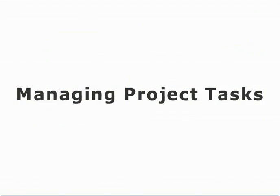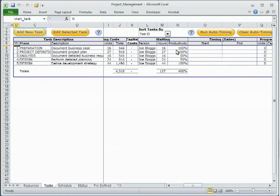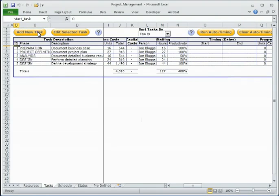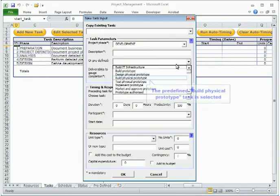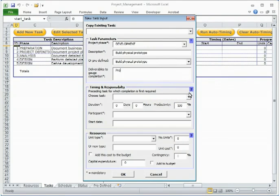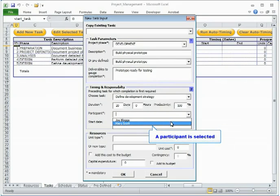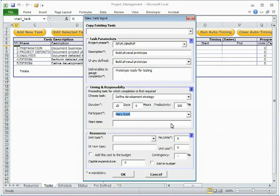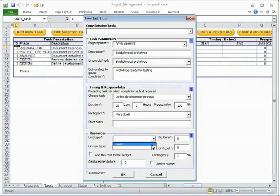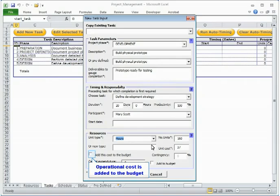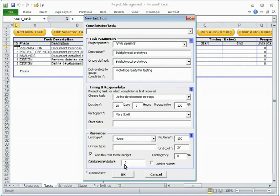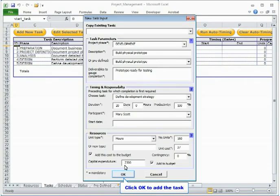Defining and Entering Project Tasks. Click the New Task button to create a new task. Task parameters can be either entered manually or selected from predefined text. Timing and Responsibility parameters define task dependency and participant information. Optional specified start dates override the automatic scheduling. The resources are prefilled with values for our units based on participant details. Other unit types can also be defined here and information added to the project budget.